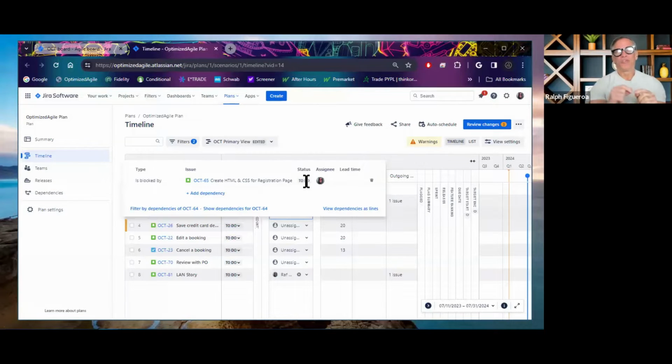So if I'm doing sprint planning, and my goal in the sprint plan is that I'm committing to work on that ticket and finish it during the sprint, before I commit to finishing that ticket, in this scenario, I will reach out to the lead engineer or the engineer here, in this case Raf, and say, hey, I'm planning on working on this story, but it's in the to-do state in your board. Do you think you're going to be able to complete it on time?